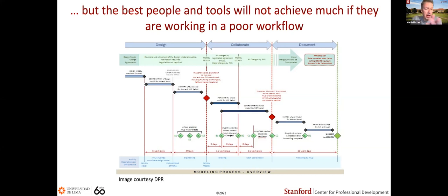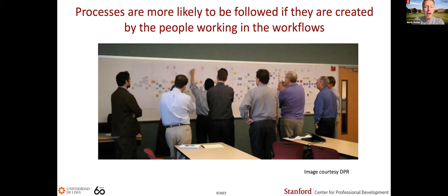But that was exactly my experience on the bridge project, right? We did not identify this gap. And as a result, we fought with each other, builder, designer, for the whole project. So we must have a good workflow, and that is best accomplished when we create it together. We have very entrepreneurial people in our industry. So it works much better when the people that have to execute the workflow are also defining it. Of course, today this is not only done with Post-its, it's done with digital Post-its. But same idea: workflow on a project works really best when people make commitments in front of each other.